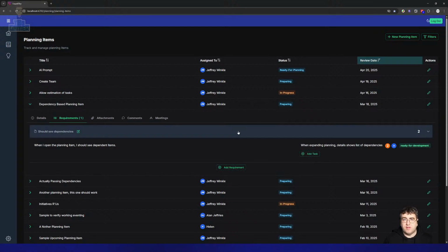So if you have an initiative and then you add a bunch of work to it, it will highlight the fact the initiative is now off track and at risk because stuff was added post start of the initiative. A bad example will be changing from React to Vue. A good example will be changing the method you're doing something while still pushing features.